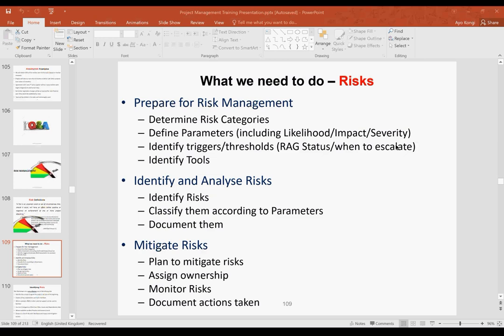Where do I put it? Well, if something is an IT project or an IT risk that will not be fit for production, I'll rather put it under IT, and I'll put an action on it to say this involves production as well. So what I'm doing here is determining the risk categories, to say what category of risk is this, what category of risk is that.